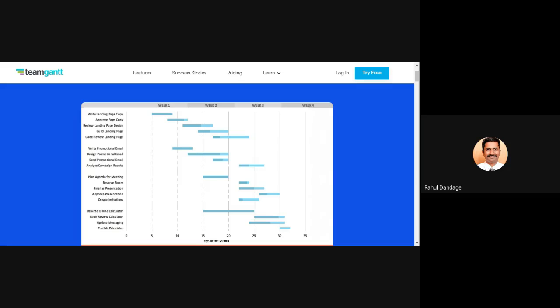There are two different colors. So sometimes what can happen is, in a same diagram, you can also represent the duration which is planned and the duration which is required to complete that activity. So using multiple colors, you can show whether the activity is completed within the specific time, or whether the activity required some different time than it was planned.